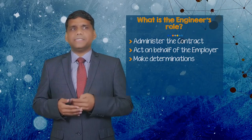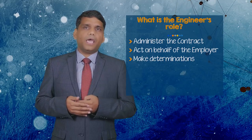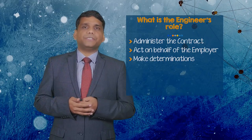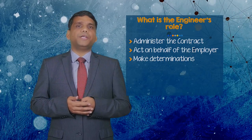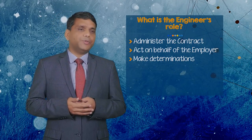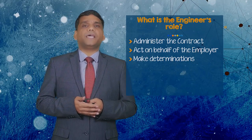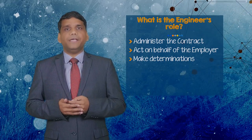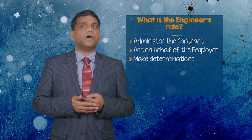Let us discuss the engineer's role. The engineer's role is to administer the contract, act on behalf of the employer as his agent, and also make determinations. The engineer is not a party to the contract. The obligation is on the employer to appoint an engineer who shall carry out the duties and responsibilities assigned to him in the contract — referring here to the term 'contract' as defined in sub-clause 1.1.9 under FIDIC conditions of contract, not the consultancy agreement between employer and consultant.